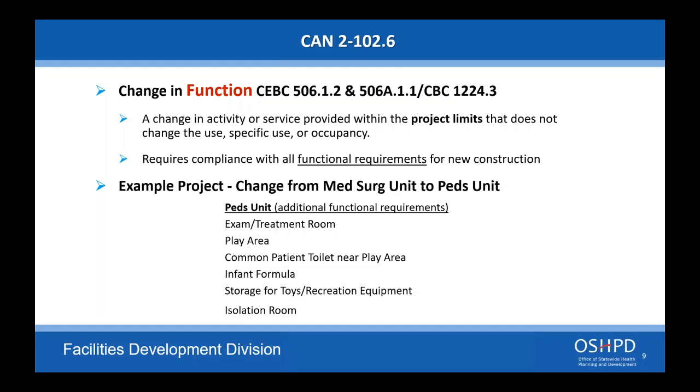And a lot of these are being reviewed in the field, so they're pretty quick. We're looking at what equipment is being removed, reinstalled, re-anchored, slopes of roofs, things like that. So there are a lot of things that are involved in that. But they are typically reviewed in the field.